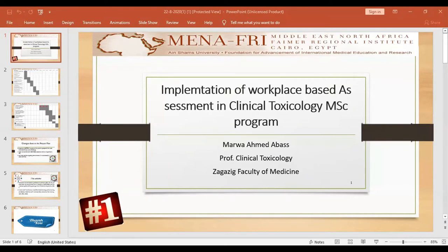My project was about implementation of workplace-based assessments in clinical toxicology for MSc programs. The Gantt chart shows the first two months, January and February, with preparatory steps including formulating a team from clinical toxicology staff. This is already done.